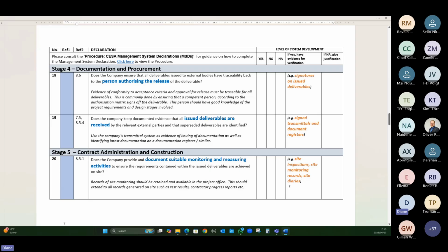And what I'm also picking up is a lot of engineers keep all their records on site and they're not doing backups back to the office. I always recommend make sure whatever you're generating on site, have a record back in the office. I mean, there have been stories of site offices burning down, site offices being blown into dams. We had also an incident where an RE was hijacked and his car was stolen and he had all the documents in his car, but they hadn't been backed up back to the office. So in those cases, a lot of the information gets lost.